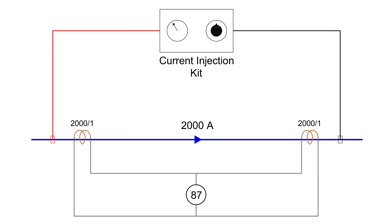Now, let's talk about the importance of this test. Primary injection test is the final commissioning check to confirm that all equipment and protection schemes are working as designed. This test also helps in checking the polarity of connected CTs, which is verified through a stability test.